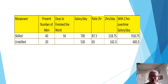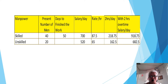The work can be finished with this number of men in 50 days. For the skilled worker being paid at $700 per day, with 2 hours overtime, that would mean $918.75. For the unskilled worker being paid at $520 per day with 2 hours overtime per day, that would mean $682.50.